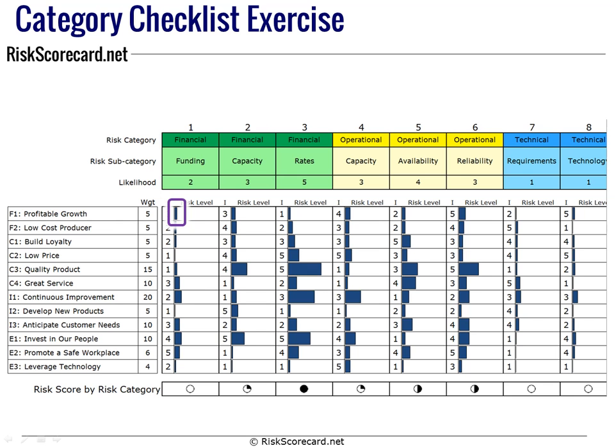Now, what we can also do is sort of add those up to give us a Harvey ball that represents the overall aggregate risk by that category. So in this case, funding, the Harvey ball is empty. It shows not much risk relative to the others. Under capacity, you can see we have a 1/4 Harvey ball. In this case, leadership has decided to consider only those which are half, like this one here, 3/4, or full, in terms of they're looking at second, third, and fourth quartiles of where the category manifests risk.